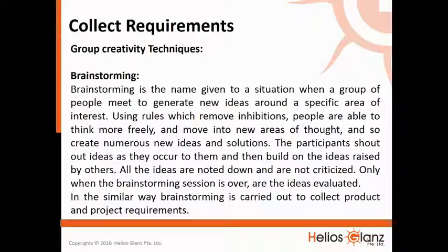The participants shout out ideas as they occur to them and then build on the ideas raised by others. All the ideas are noted down and are not criticized. Only when the brainstorming session is over are the ideas evaluated. In a similar way, brainstorming is carried out to collect product and project requirements.